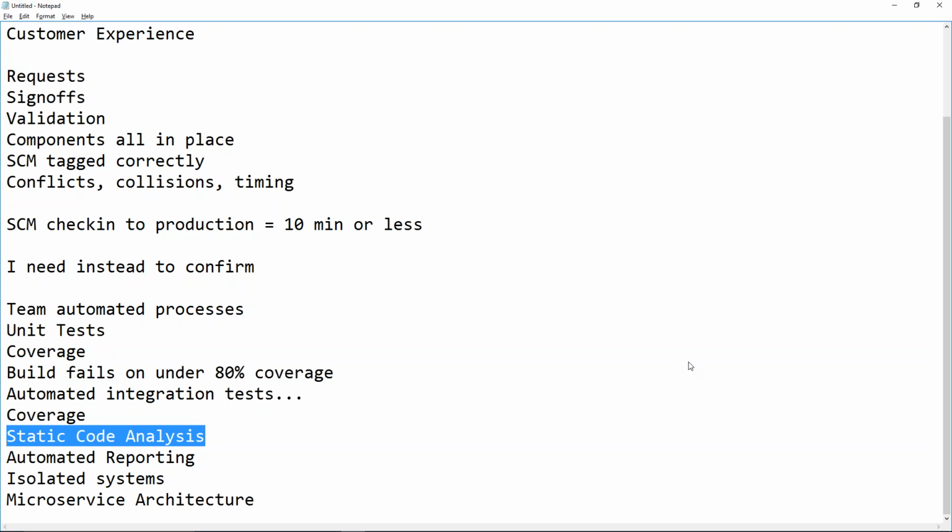But the general Agile direction is overall prioritization, not separated prioritization between bugs and features. I don't know if I answered your question well, but a big chunk of bug management turns into bugs being additional things that somebody would like, and they need to be prioritized like everything else.